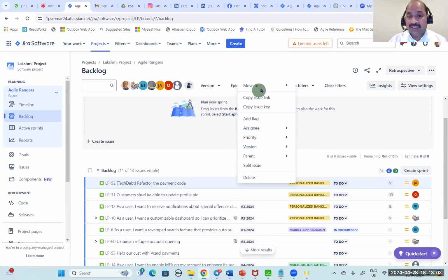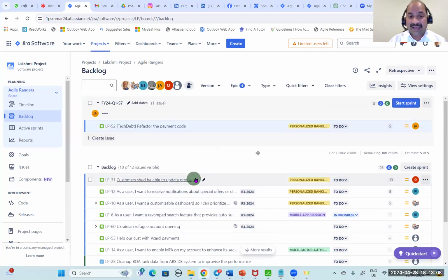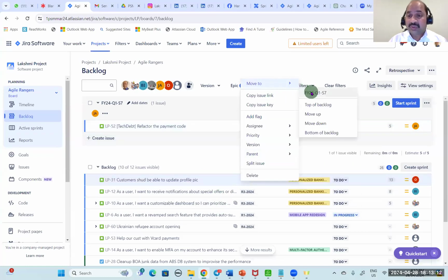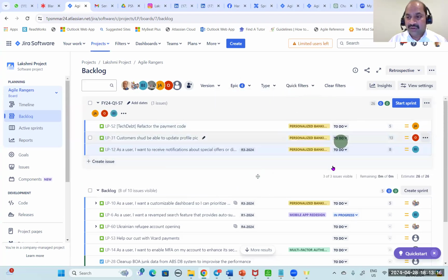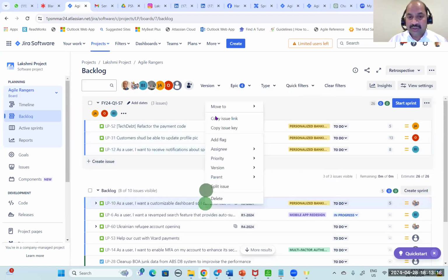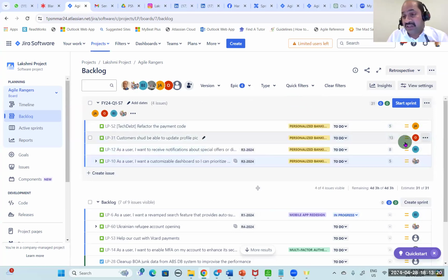The team starts taking the work from the product backlog into the sprint backlog during the sprint planning meeting. Now let us assume the team took these requirements and, based on their capacity, said they are good to complete them. So the team needs to complete 31 story points.